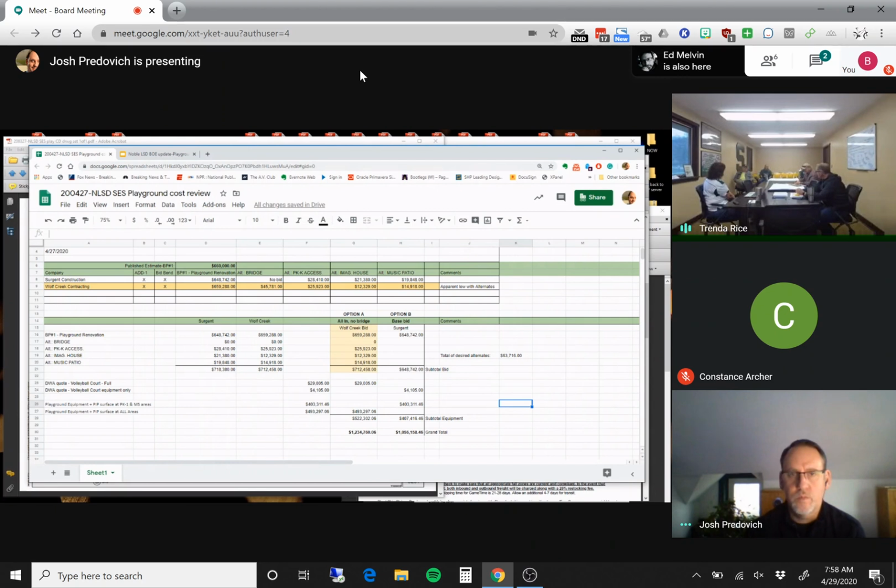We've already had all those conversations with both contractors. Neither one of them has any concern right now with COVID-19 issues. They're not seeing slowdown in either staffing or materials at this time. Nobody had any concerns about long lead time items. They'd like to get the head wall and the storm piping submittals in as soon as they can. With approval from the board today, we'll issue a notice to proceed today, which will be a few days ahead of schedule. And unless there's any objection from the district, we would tell them that they can have access to the site immediately.